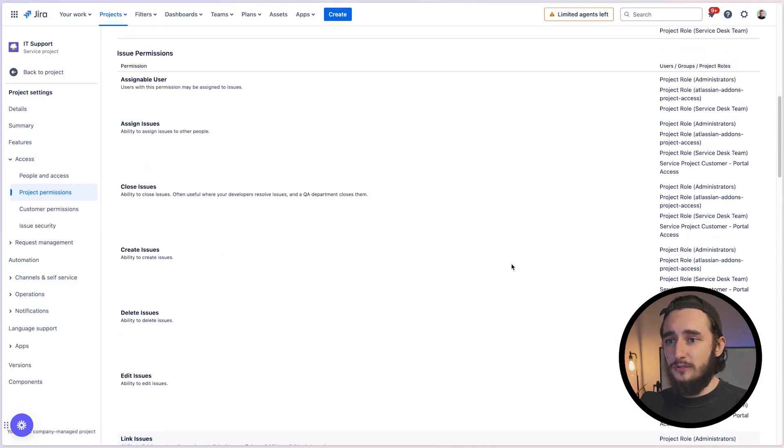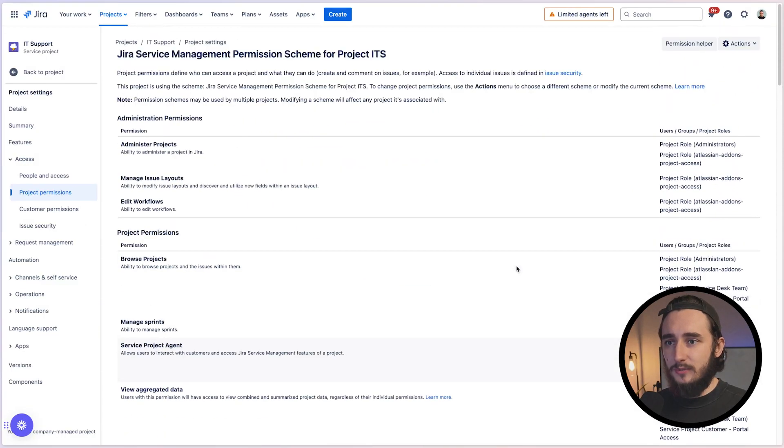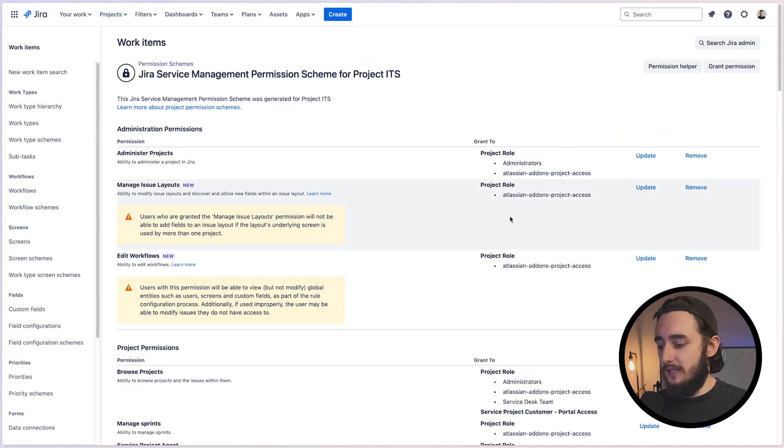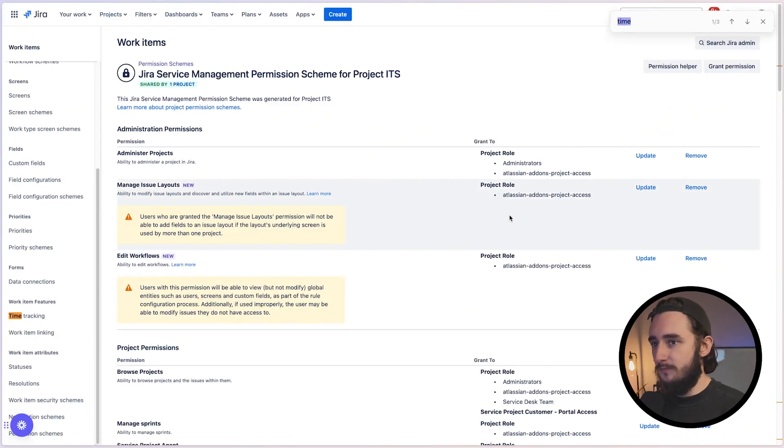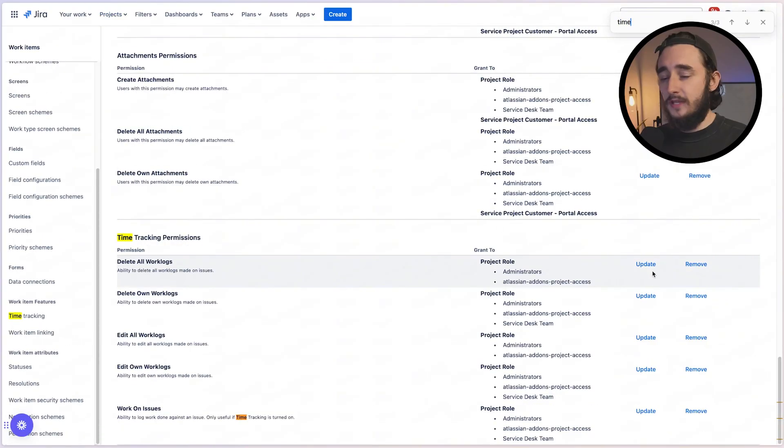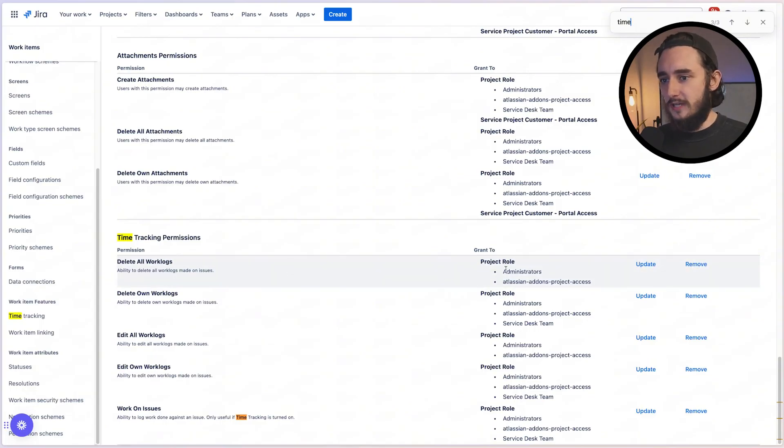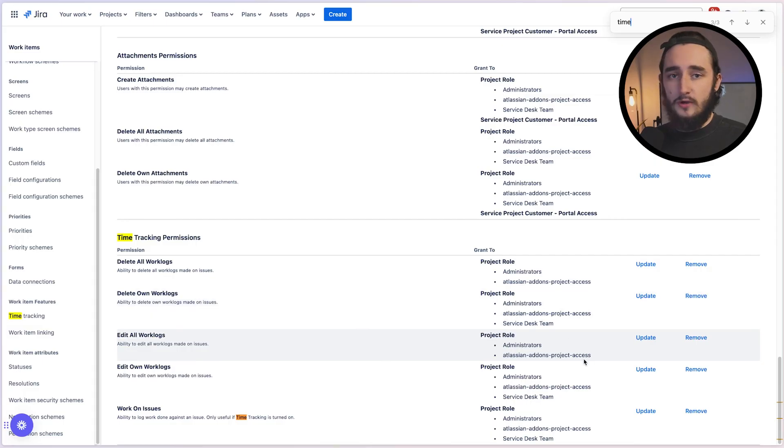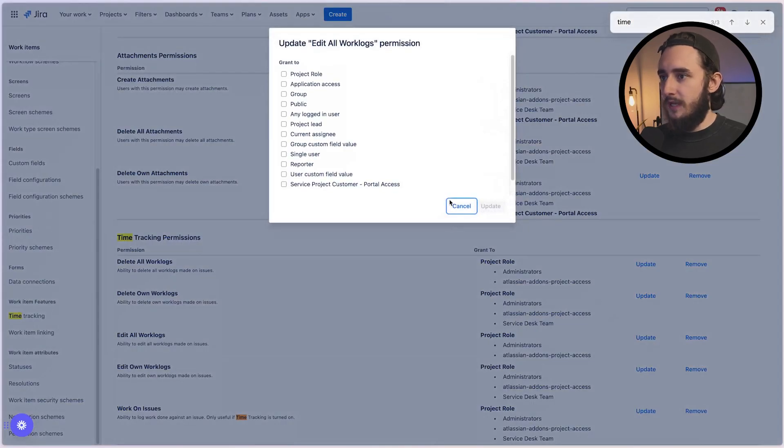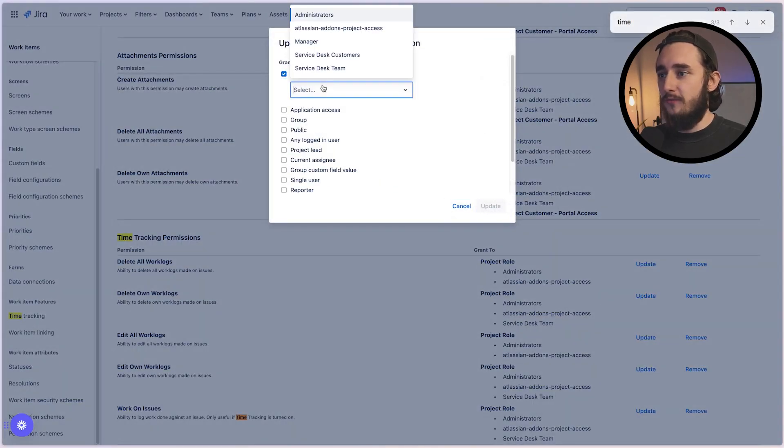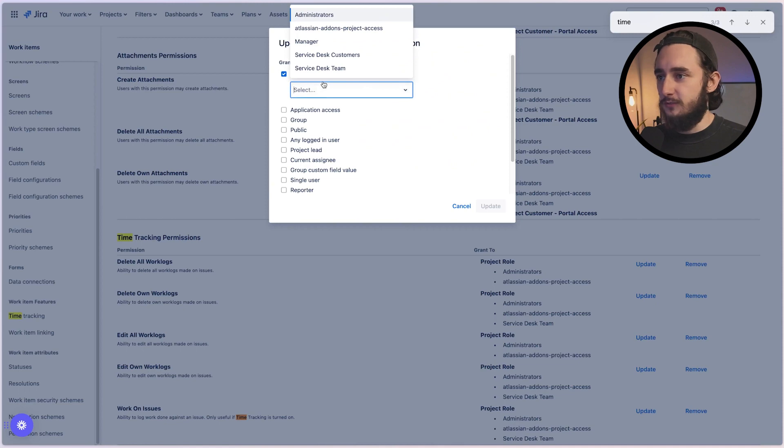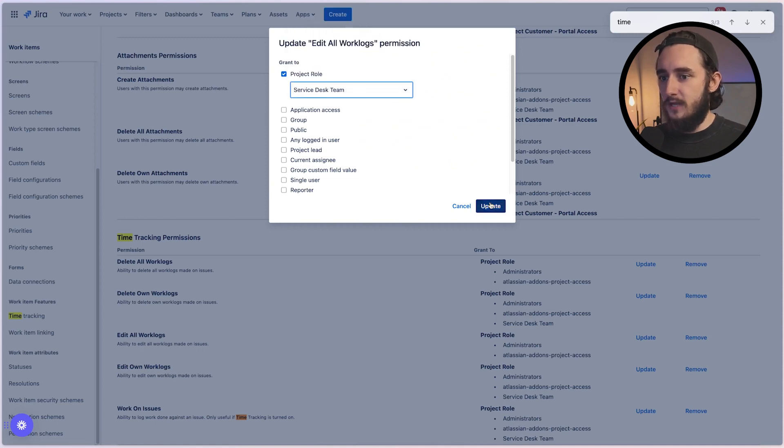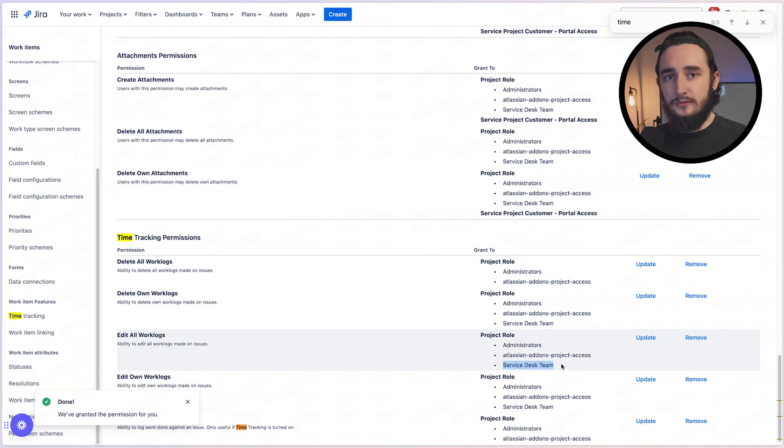So to add or remove these, all you have to do is scroll to the top and click on actions, edit permissions. And then when you're actually editing the permissions, I'll find the time tracking once more. In here, you could update or remove the users or project roles associated with these items. So let's say I wanted the ability to edit all work logs to go to all service desk team members. I'll click on update. And then I'll click on project role and I'll find the project role that I want to associate this with. So service desk team update. And now if we take a look here, we have that role added to our permission.